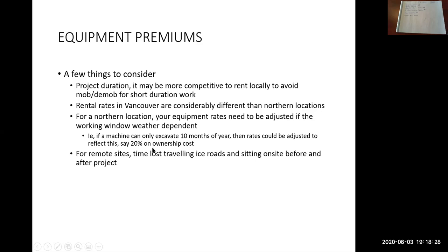So you will have to, depending on how far north the project is, analyze whether the work goes over the winter period. Are you starting in the summer? So you work through the summer, you get into the fall, but then when winter hits, you have to stop and you can't work because it's too cold. That's possible. And you may have to come back in the spring.